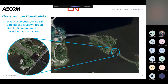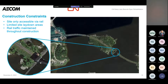With that determined, next up was design of the rehabilitation. A few construction constraints: the site was only accessible via rail, meaning not only did workers have to go out there by rail every morning, but also any equipment or materials had to be taken out by rail — traveling a couple miles every day to the site, complicating what type of equipment and materials could get out there.